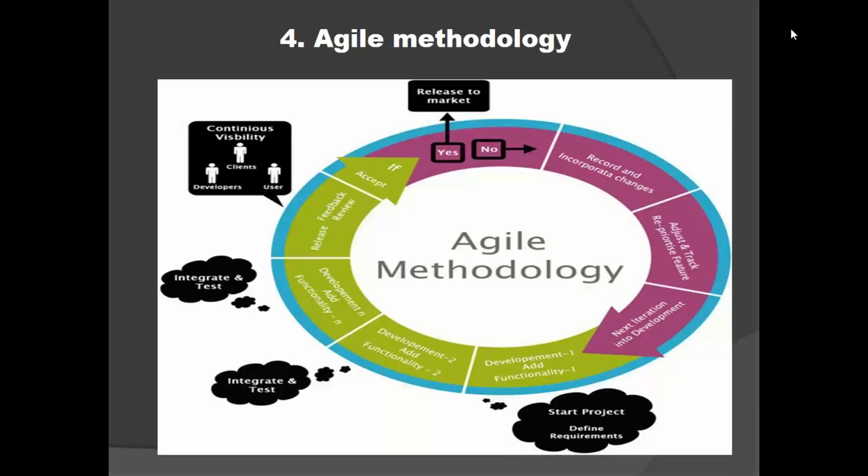Now, how the development process goes in agile: we are going to divide the project into parts, which are nothing but modules, as we know. But again, in each module we are going to have iterations. The time period for iteration should be between 7 to 21 days.